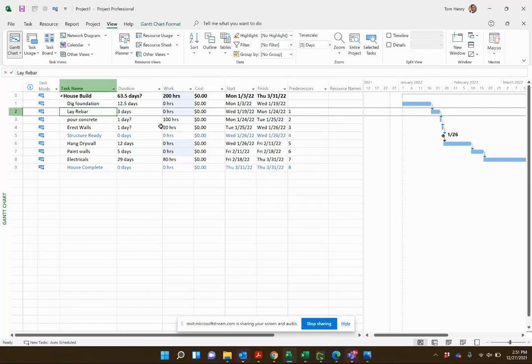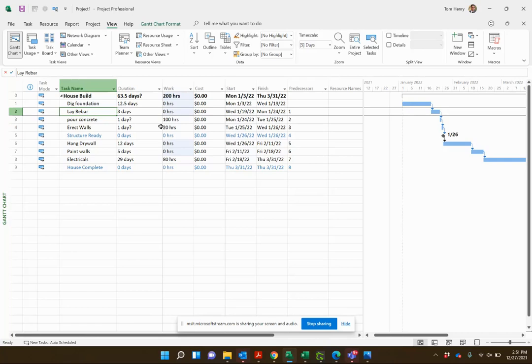The other option, if you don't need that granularity in terms of how many square feet of concrete you need or how many bricks you need, you just say I paid a contractor fifty thousand dollars for bricks. Done. You could leverage a cost resource for that as a fixed cost. If you need the granularity into how much of a certain product you leveraged, or if I need more of a product, how much that's going to impact my project cost, you're going to want to use a material resource.